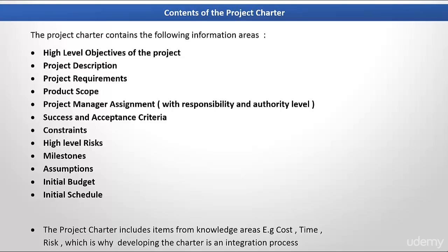So as you can see from the project charter content in this slide, the charter includes items that are relevant to all the different knowledge areas, including budget, risks, scope, time, etc. And this is why developing the project charter is an integration process.